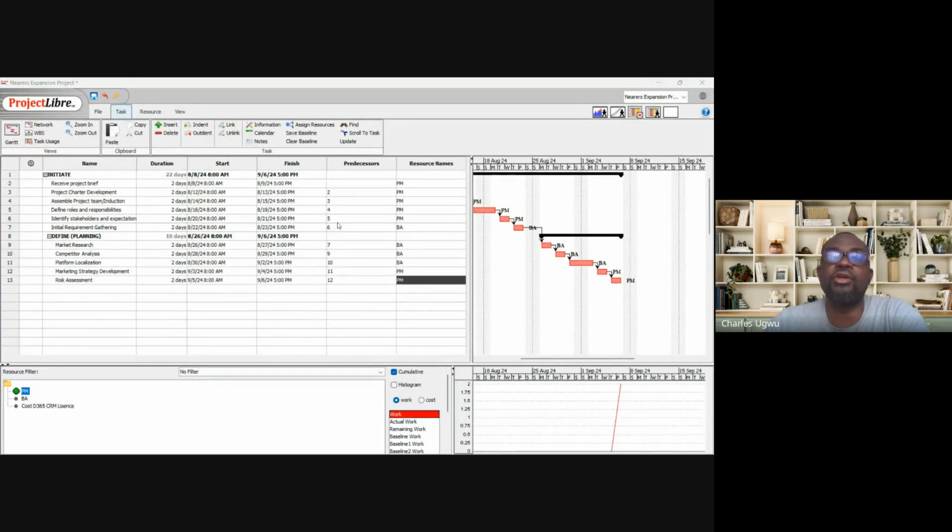you tap this resource here. You can see it here. This is resource assign. This particular icon is for assigning resources. Even if you come up here, you see it's the same icon. If you click on this icon, it will open this dialog box where you will click PM or highlight PM, and you click assign. Once you've done that, if you go back, click close here, and then close this one again, you find out it's already assigned.